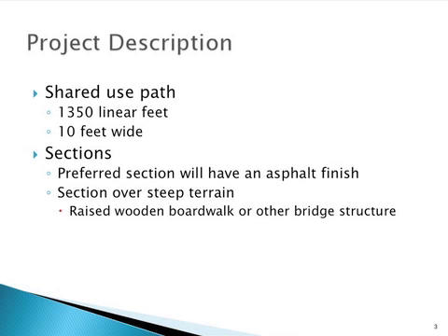The first slide shows that the centerpiece of our entire project is a shared use path. The project dimensions are 1,350 linear feet by 10 foot wide. There are also going to be a couple different sections involved within the path. The preferred section will have an asphalt finish and be the most used section of the project. There will also be a section over steep terrain. To combat this, a raised wooden boardwalk or other bridge structure will be implemented.